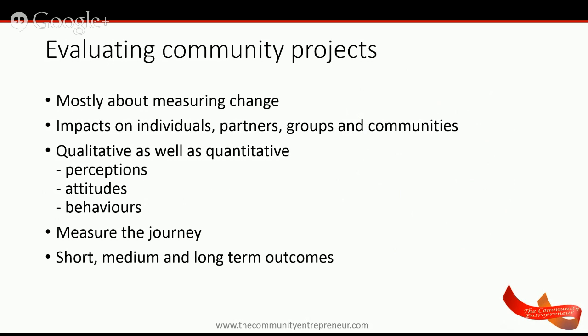So you can get initial information about how people are at the time, what their perceptions are, what their attitudes are, how they participate, what your partners' expectations are, what your own expectations are. And then as you go through the course of the project, you can measure again, ask those questions again, one way or another, and you can see the change, and that's the measuring of the journey till you get to the end, and then you've got that summative.